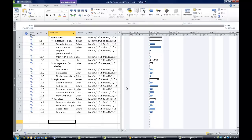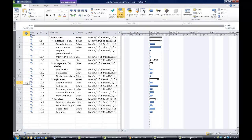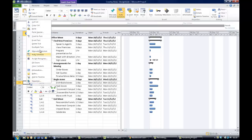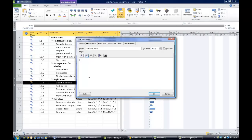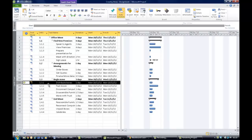The distribute boxes task is in row 13. Go over to the information column, right-click, and choose the option to insert a note. The note I'm going to add is to remind people to label boxes clearly. When you hit OK, the note is attached to the distribute boxes task. Hovering your mouse over the little post-it note icon shows you the note content.